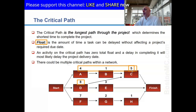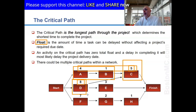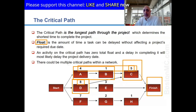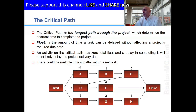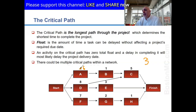The path A-B-C needs ten days, and the critical path is thirteen days, so A-B-C can handle a delay of up to three days without affecting the project finish date. Note that C is shared with the critical path — so A and B can absorb up to three days of delay, bringing them to eight days, matching D. If activity A takes six days instead of four, it uses two of those three available float days.